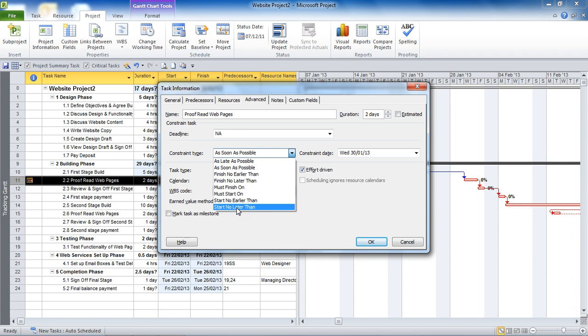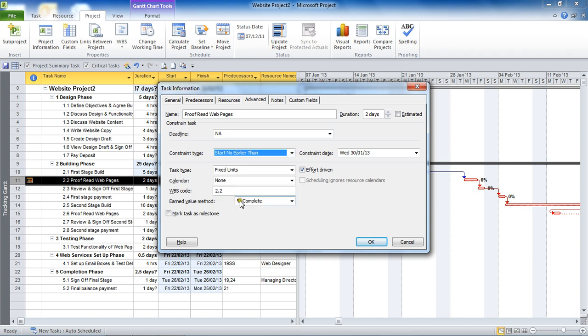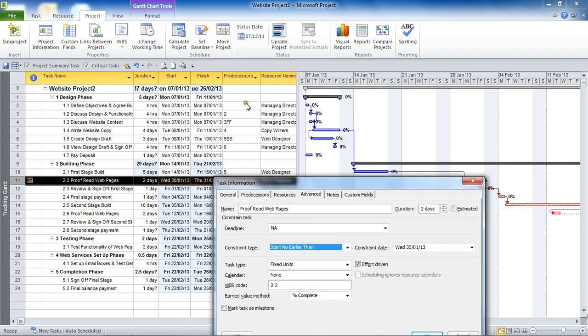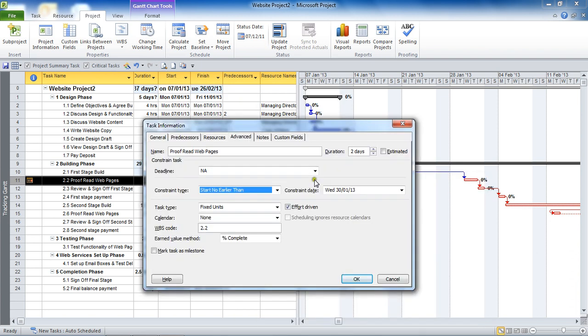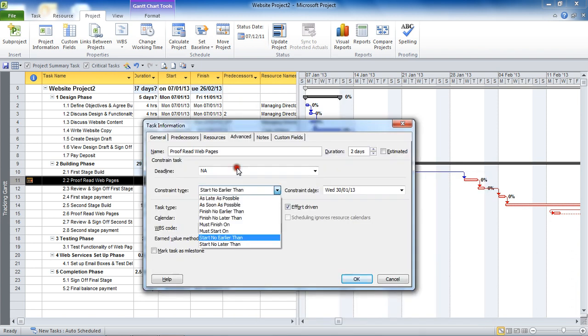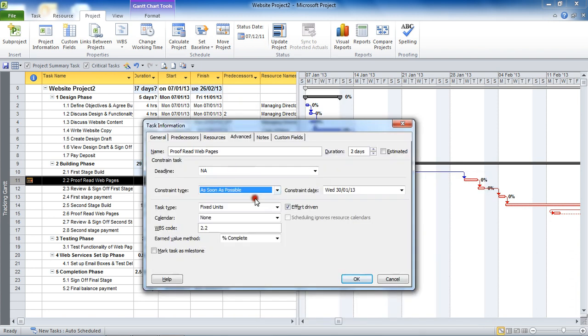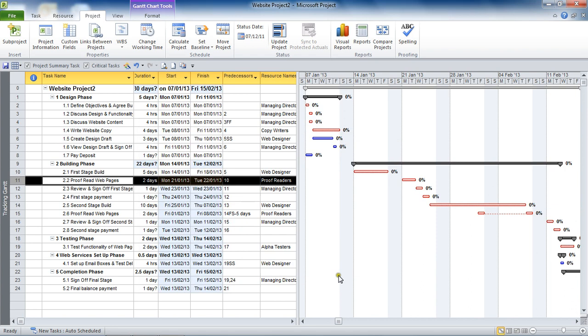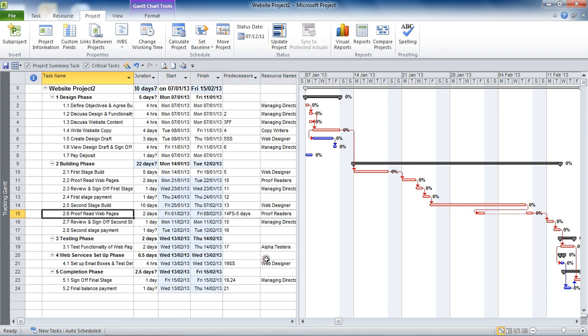So I could have done this approach to create that constraint from earlier, the start no earlier than, as opposed to using the start date. And this is probably the recommended way. For now I'm going to choose as soon as possible. Click on OK. And that constraint is removed. Because maybe now I've realized that I didn't really want that in there.